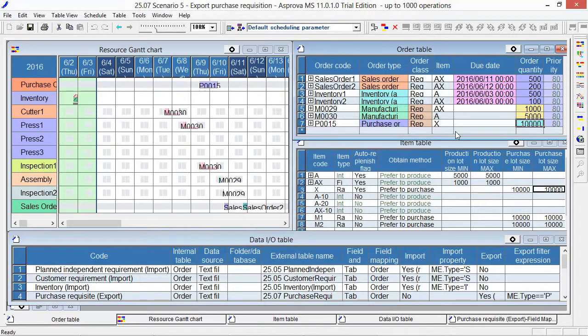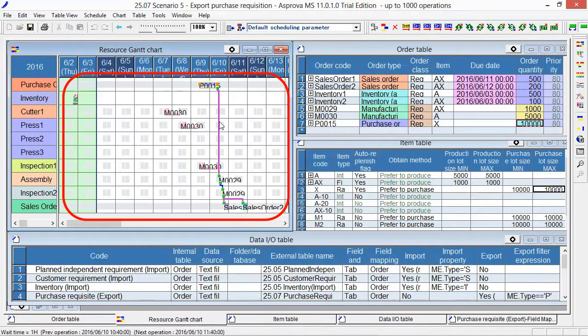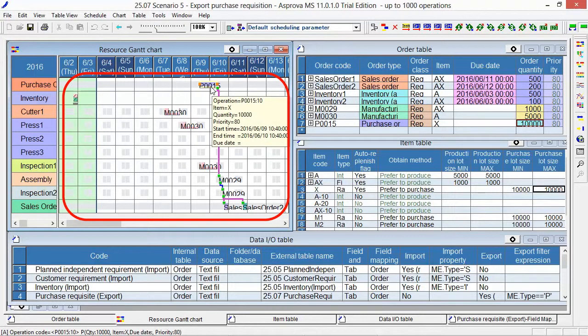Please go to the Resource Gantt chart. This is the purchase order. The lead time for purchasing is 24 hours. The start time means the time to place an order and the end time means the due date. The due date for this purchase order is 10:40 on June 10. Let's export it.